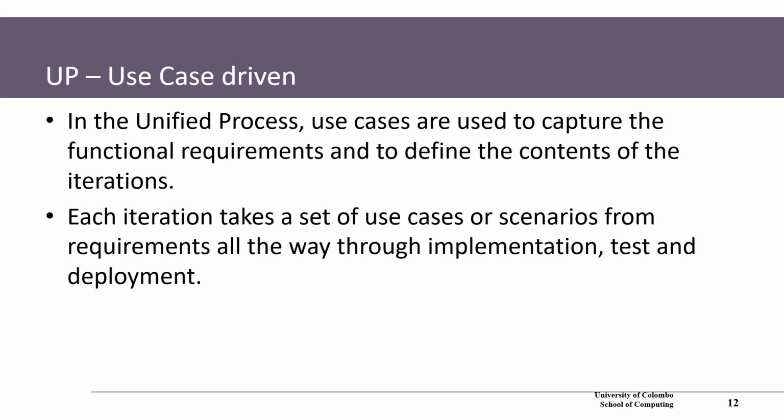So I would like to discuss a little bit more on we said this is use case driven. What do we mean when we say unified process is use case driven? Use cases are used to capture the functional requirements and to define the contents of the iterations. So in other words, the practice helped the people to incorporate the iterations. And functional requirements, well, usually people combine several functional requirements to define one iteration in the traditional incremental model.